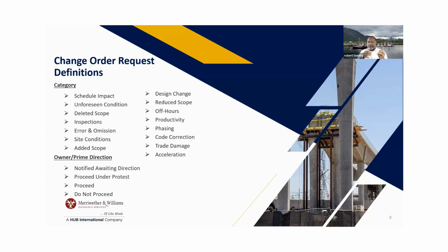Okay, the mobilization and the demo, but however, I need X amount of days to get my crew ready. So when you're writing that change order request, you need to say, I need X amount of days before I can remobilize. State exactly how many days you need, because you're coming off the job and you don't want your crew sitting around, because you can't pay them and you don't want to pay them to sit around. So you have that to be able to say, it's going to take me 5, 6 days to come back after you give me the go ahead.